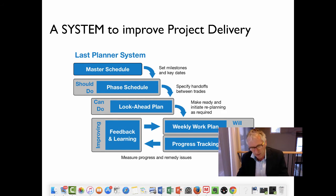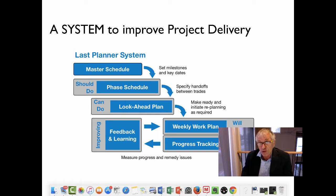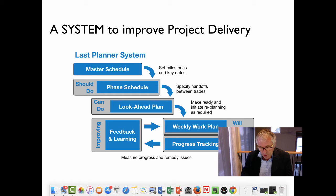It is based upon these principles: The assumption is that construction work plans are forecasted and are often wrong. Planning needs to be more detailed the closer you get to the work. Plans need to be made by the people doing the work. Constraints need to be identified and removed by the team. Construction teams must make reliable promises. And plan failures should be treated as opportunities for learning, not as a reason to blame and point fingers.